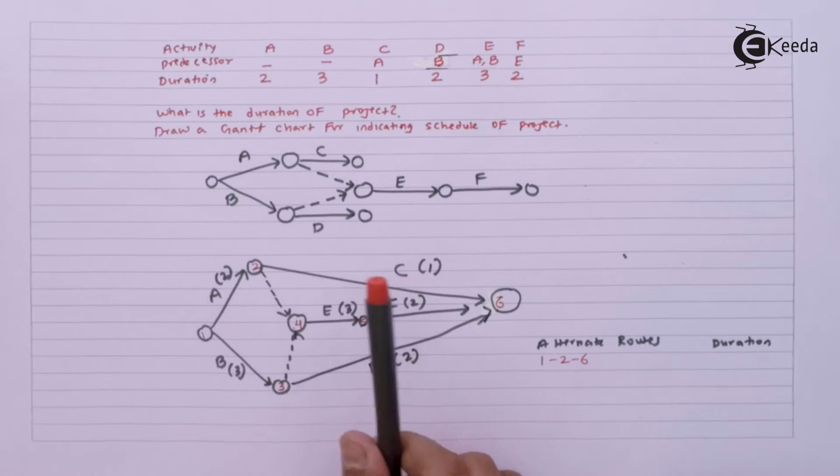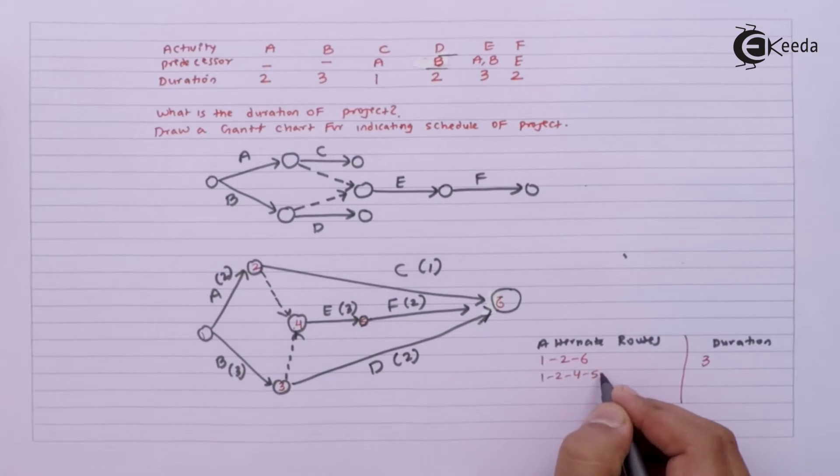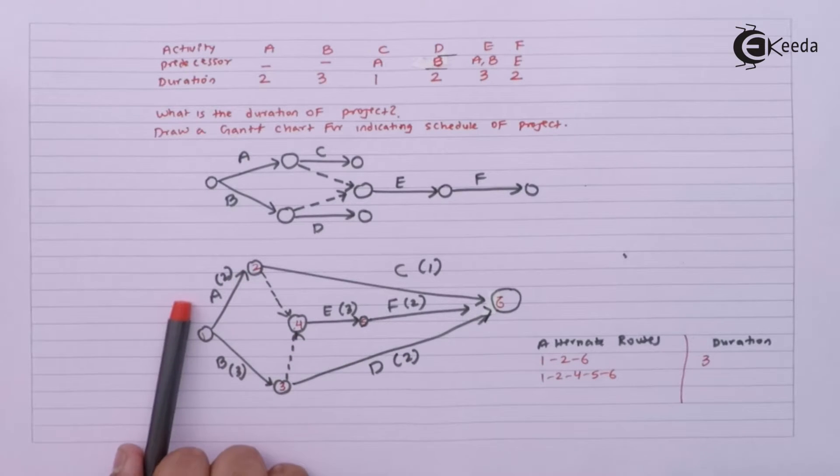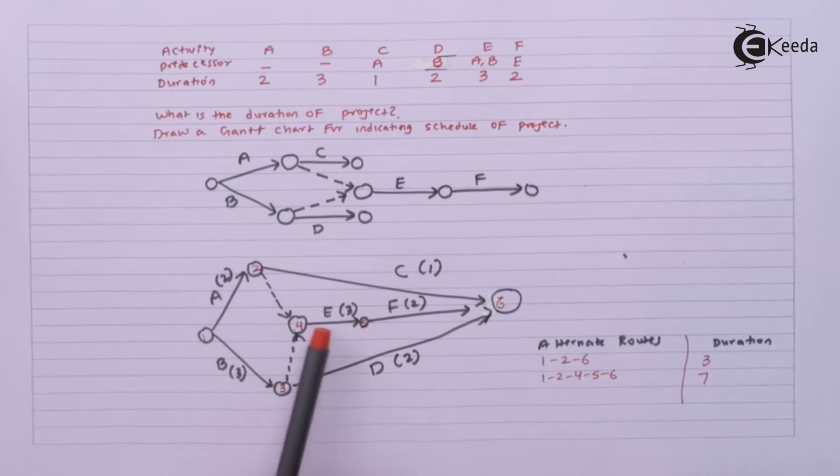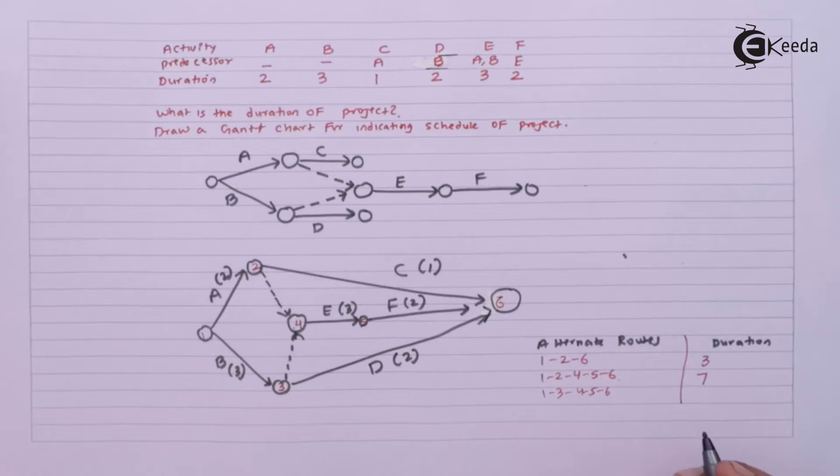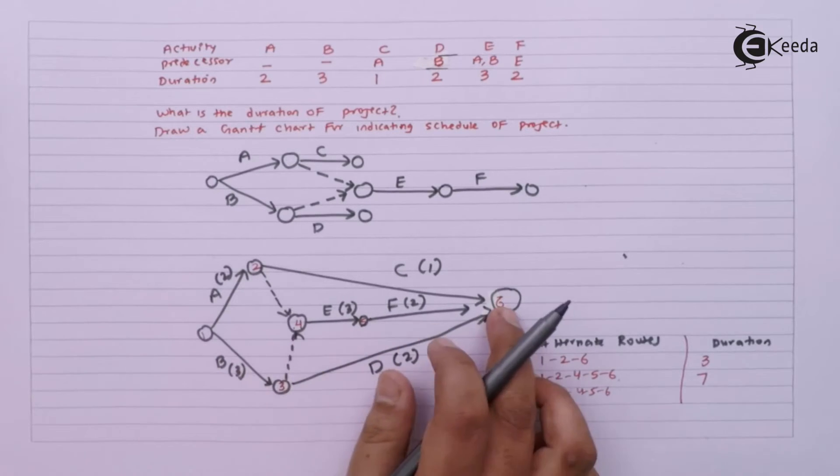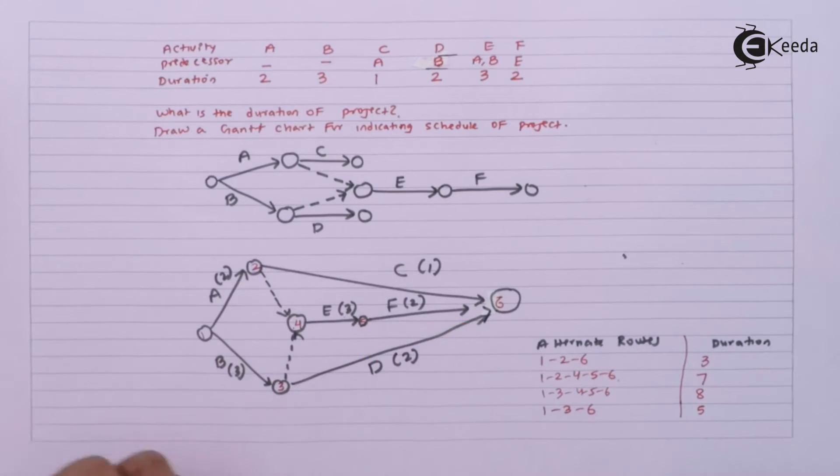My alternate routes will be: one-two-six which gives 2 plus 1 equals 3. Then one-two-four-five-six gives 2 plus 3 equals 5, plus 2 equals 7. One-three-four-five-six: 3 plus 3 equals 6, plus 2 equals 8. And last we have one-three-six which gives 3 plus 2 equals 5. So one-three-four-five-six with duration 8 becomes your critical path.